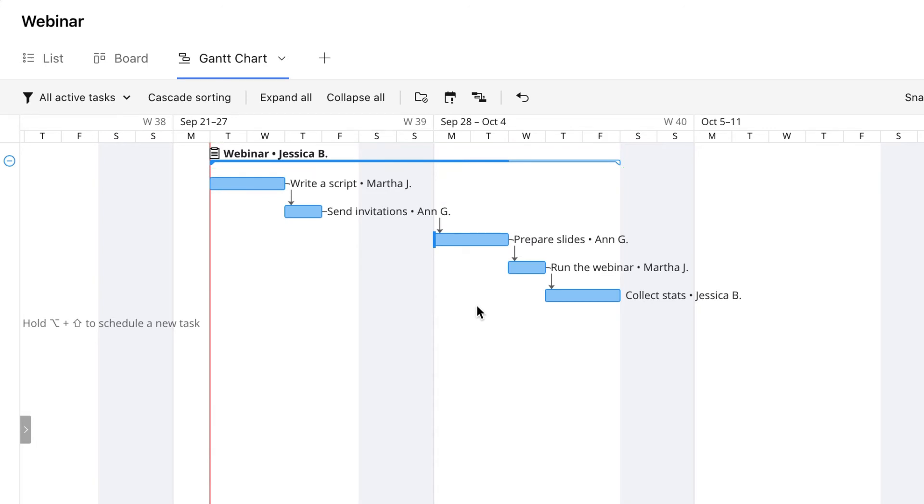Second, dependencies help everyone to know exactly when they need to start working on their tasks. Once the previous task is marked as completed, the person responsible for the next task will be automatically notified that they can now start working on it.